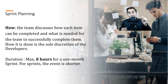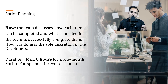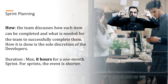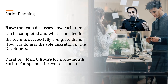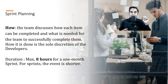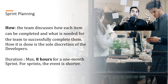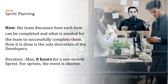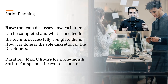How the work gets done is the sole discretion of the developers. Even though direction is given by the product owner, how fast to go and how to proceed is determined entirely by the developers. The product owner is not the boss or manager. By 'developers,' I mean not only coders but also testers, business analysts, subject matter experts — everyone on the scrum team who is not the scrum master or product owner.